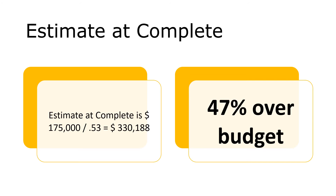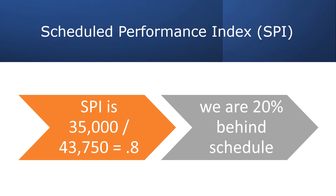While this is not the most accurate calculation, it is accurate enough to identify trends in time to take corrective action. Our Estimate at Complete is $175K divided by 0.53, which equals $330,188. We predict being 47% over budget by this calculation. The Schedule Performance Index, or SPI, compares earned value with planned value and is calculated by dividing earned value by planned value. Our SPI is $35K divided by $43,750, which equals 0.8 — so we are 20% behind schedule.